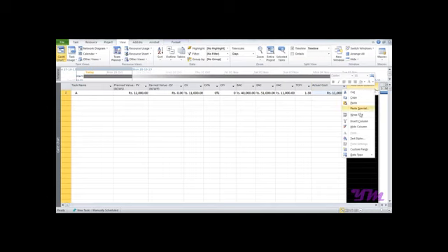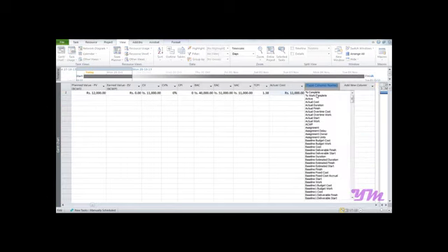Then we need to further go ahead and add another column which is known as percentage work complete, which we also know is 25%. So once you enter this value, you can see the CPI comes out to be 0.91, which is exactly the same that we saw in the project. And now if you want to find SPI, go on over here, add column SPI, and you can see that it's 0.83. That's also similar as that we got in the previous part.